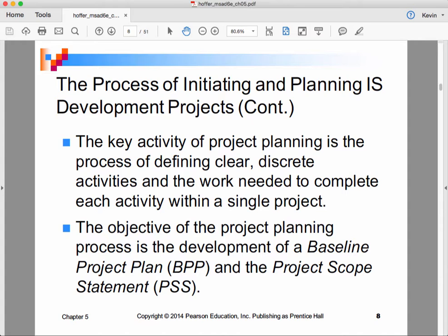I would say that in an agile approach, the things that you would be developing would be a product vision statement, some collection of user stories as an expression of what the scope is and the functionality that we are trying to address, and probably the organization of the user stories into some kind of a backlog which would prioritize them. Okay?